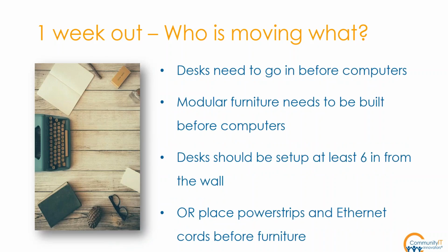All right, so this is some more logistics with the actual move. Obviously, desks need to get moved in before computers get moved in, otherwise you'll have nowhere to put them. If you're getting new modular furniture, it all needs to be built before the computers can go in.